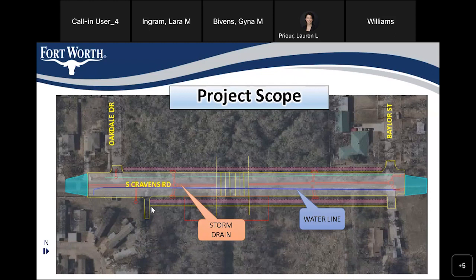I understand. So we will be putting temporary chain link fence with screening on it during the construction to keep people out and for privacy. We will phase the driveway construction so that you would have access to them. We might have to work out the details, coordinating that with you as we go forward. As far as the trees, as part of your agreement for the easements, we'll have to work out how the trees will be mitigated. I keep getting very vague information, and it's really of dire importance, especially for this neighborhood.